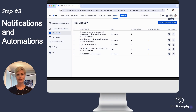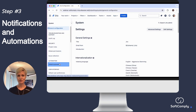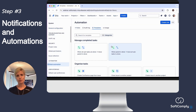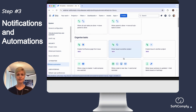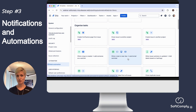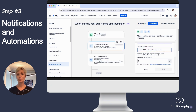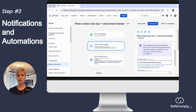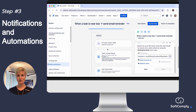Third, you can add automations and notifications as needed. For example, you can create an email notification to a risk owner three days before the risk review due date. You can choose between several JIRA automation templates — let's pick the one that sends an email notification for an upcoming task. Each step of the automation rule can further be modified according to your needs. You can modify the number of days before a certain date that the notification will be sent out, and you can also write the exact text for the notification email.